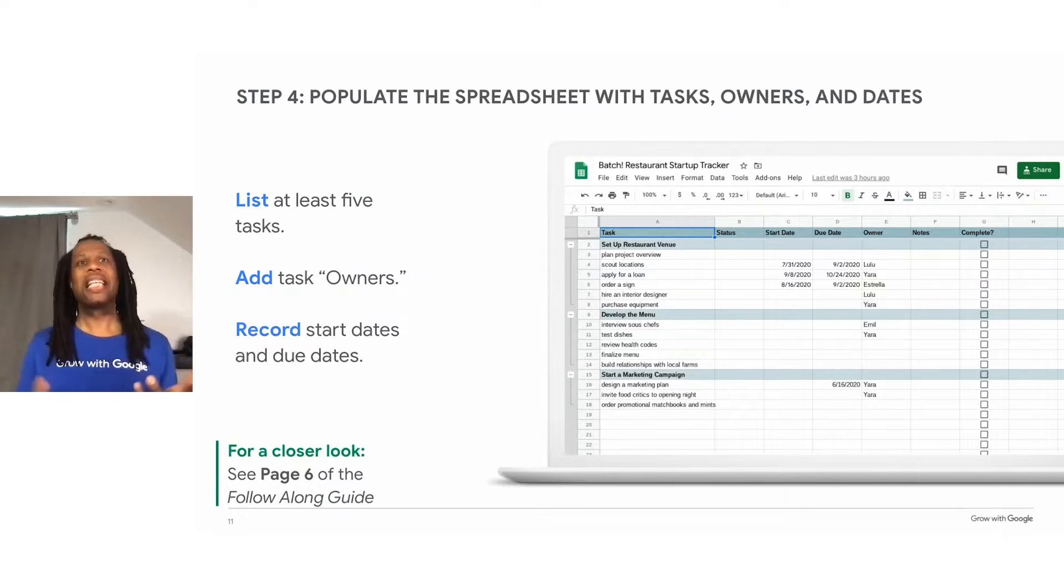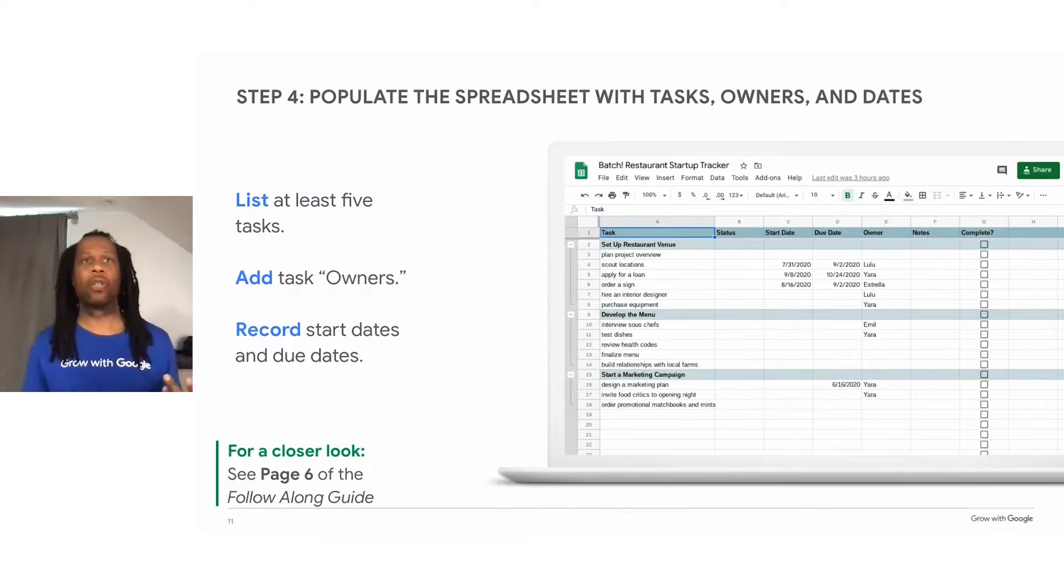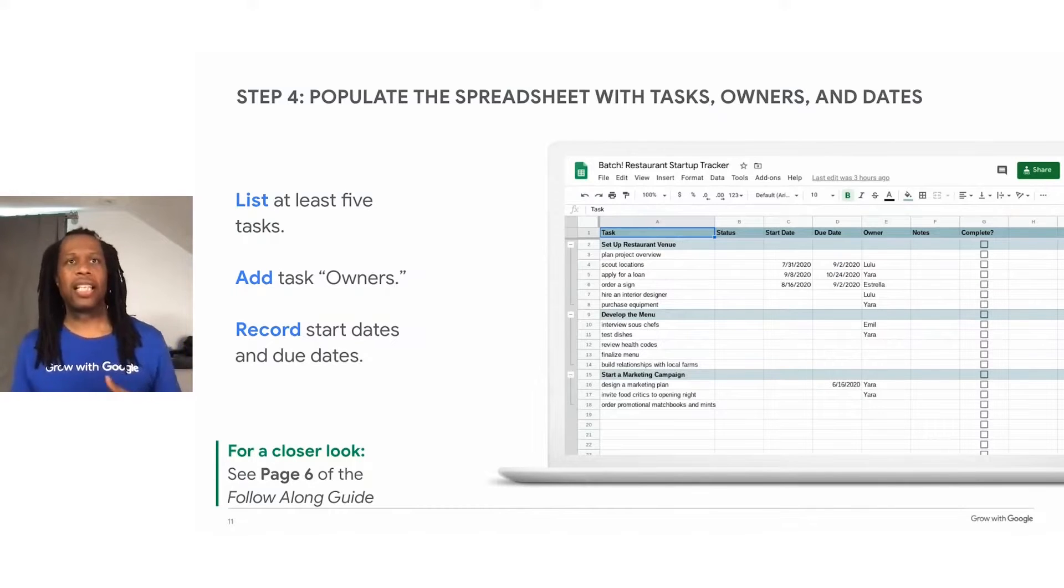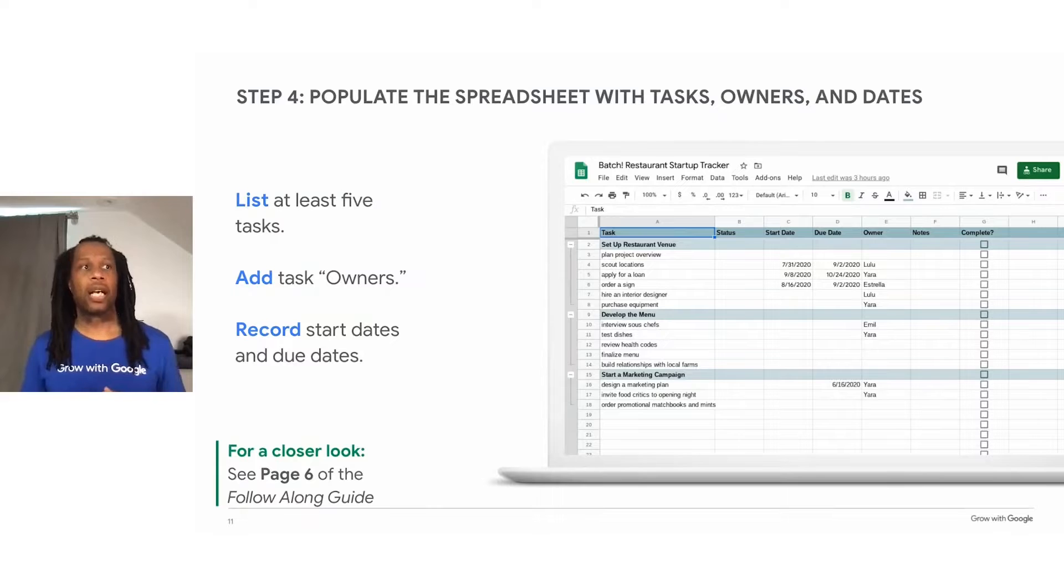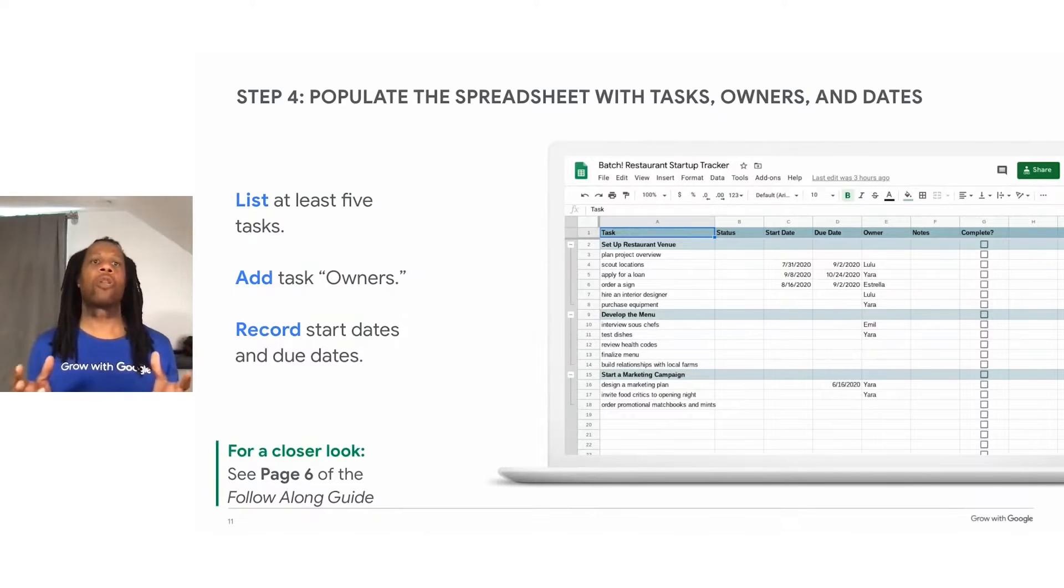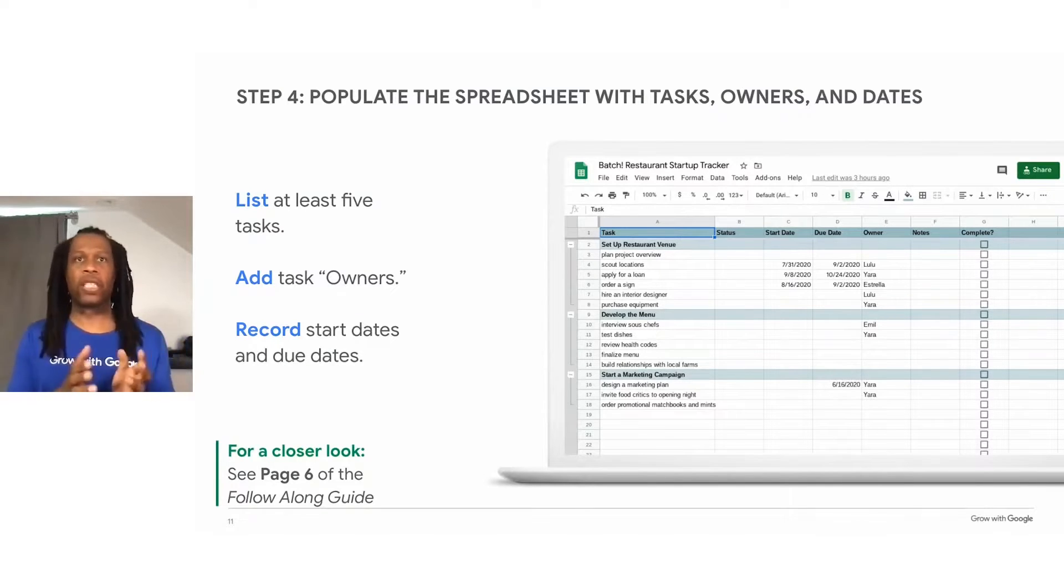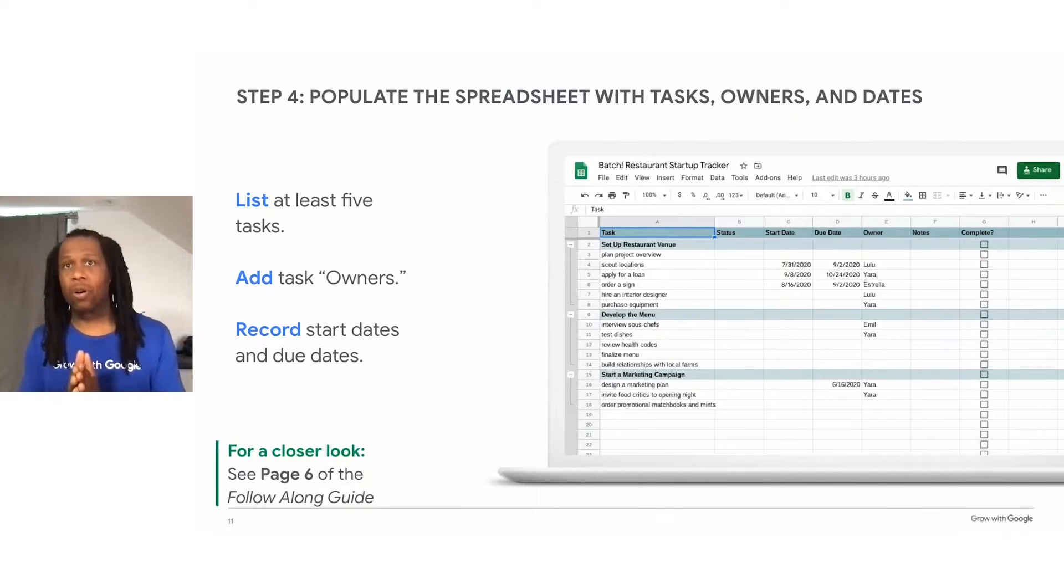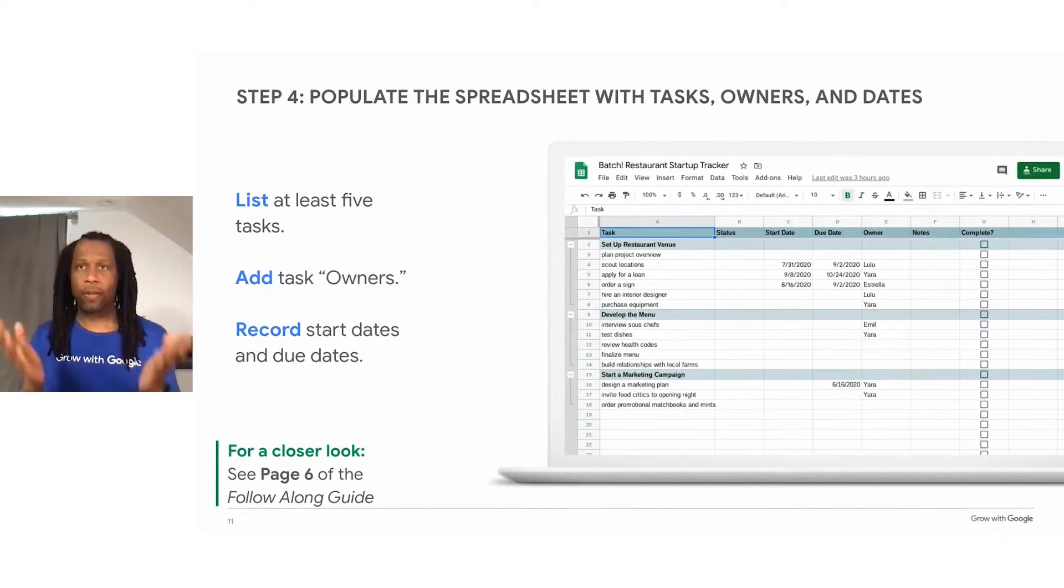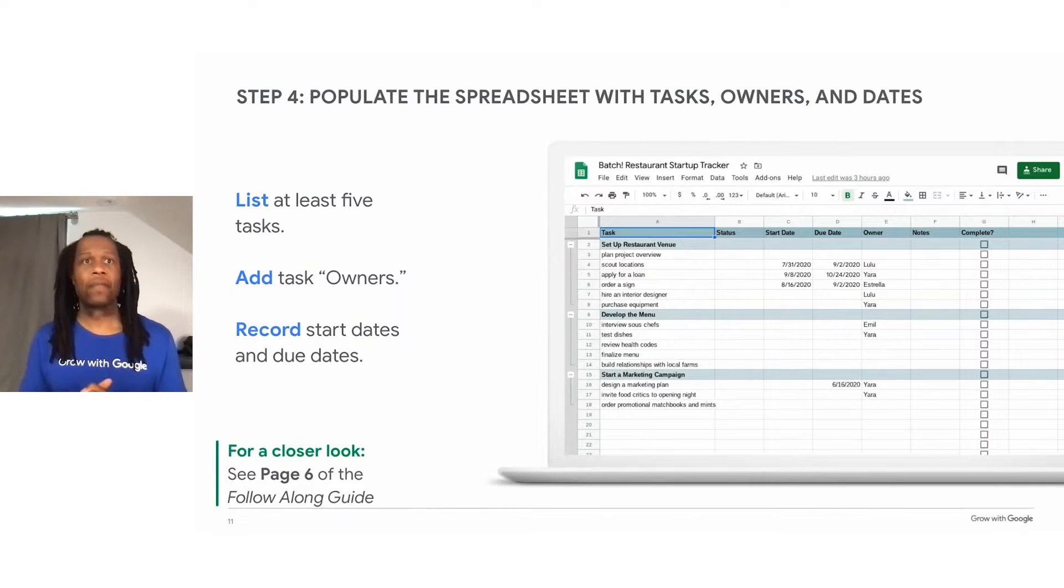List at least five tasks that need to be completed for this project to meet its goals. Listing these tasks can help you break your project into large components, and then you can take those and break those into smaller ones. Then make your tracker more specific. Enter the name of the task owners, the person that's responsible for each task, and each appropriate column.